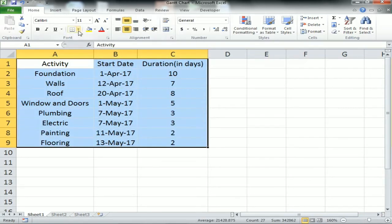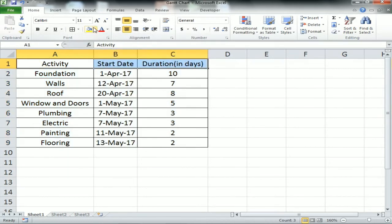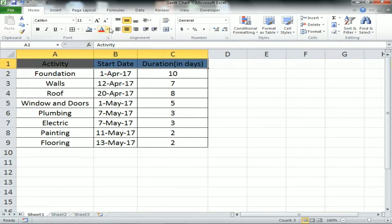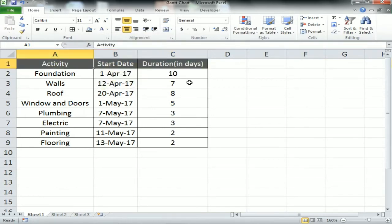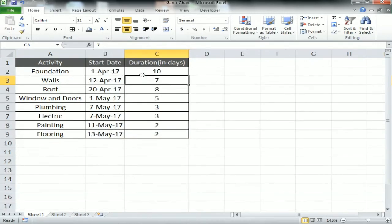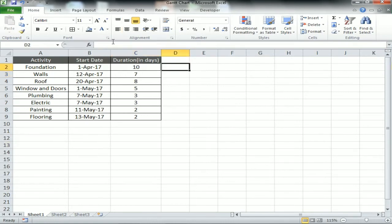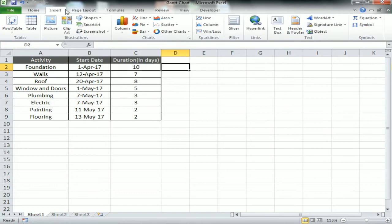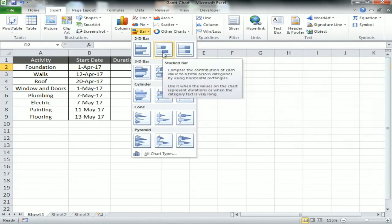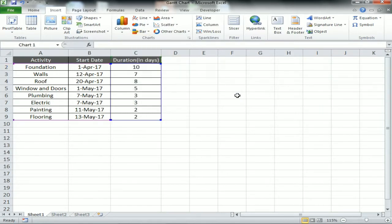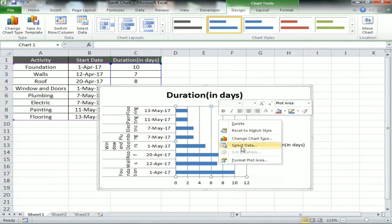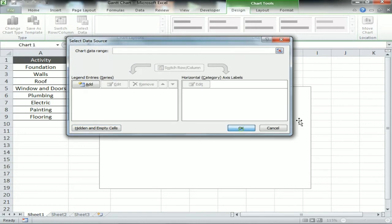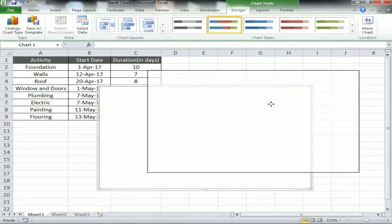This is the plan to build a house. Now how we can showcase this plan over a graph? This is just an example - you can showcase your project management graph or some other activity with duration over the graph. We can use the Gantt chart here. The Gantt chart template is not available in Excel, however we can use it from the stacked bar graph. I'm checking the stacked bar - it has checked by default data points, just remove this data. Now we have created a blank graph.